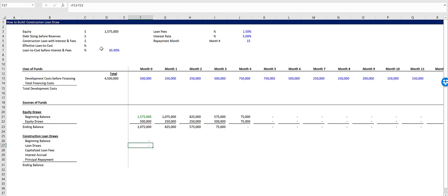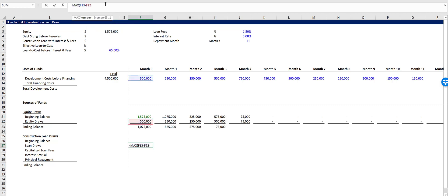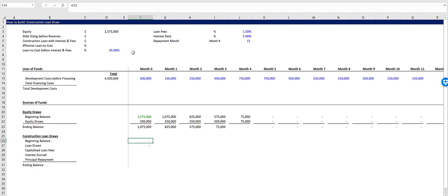Now our loan draws are going to be the development cost before financing minus the equity draws. And what we can do is we can add a max function that says, return the maximum of that and zero, just so this never returns a negative number. That's just good housekeeping in your models.